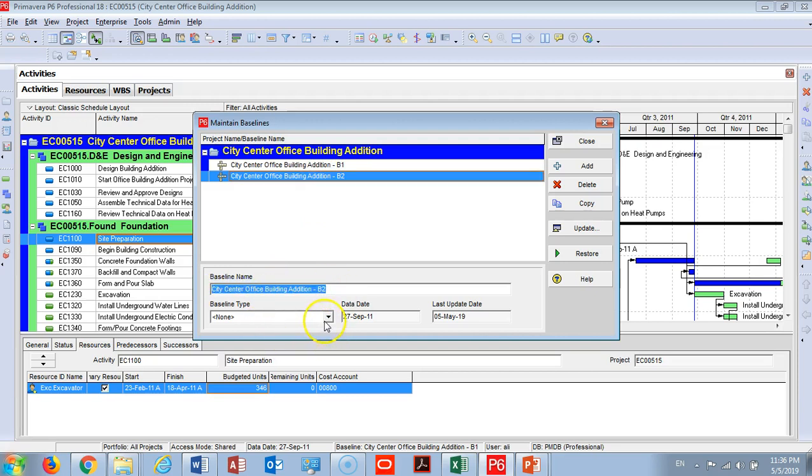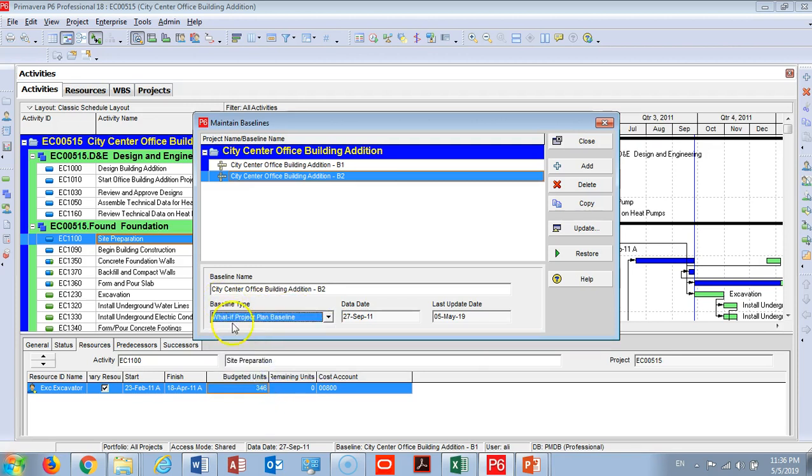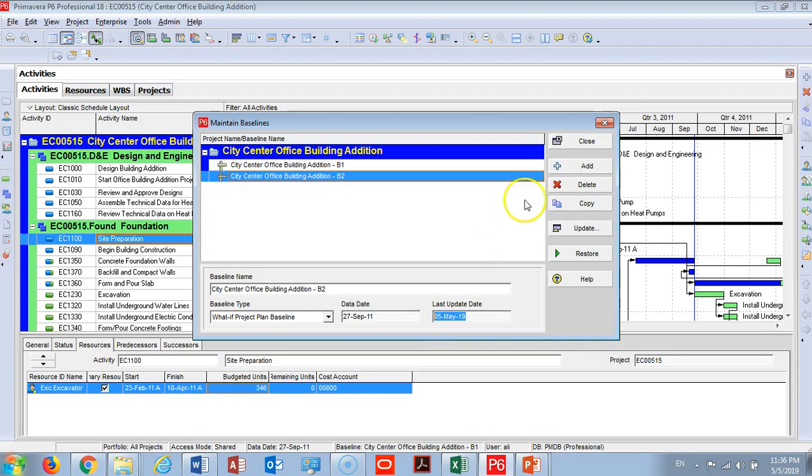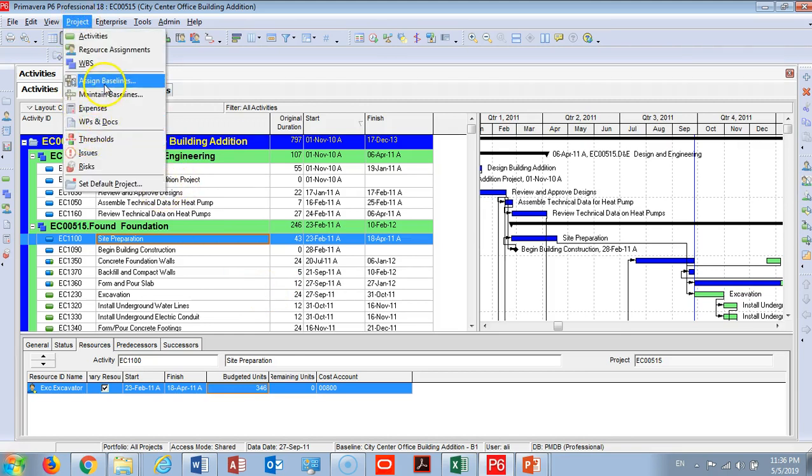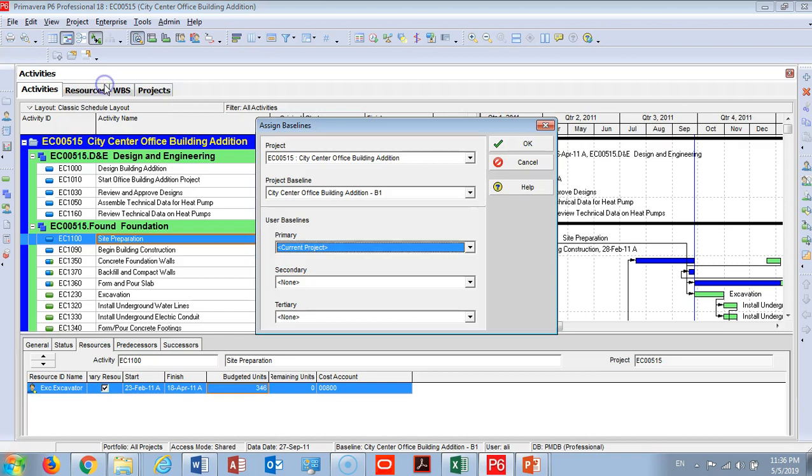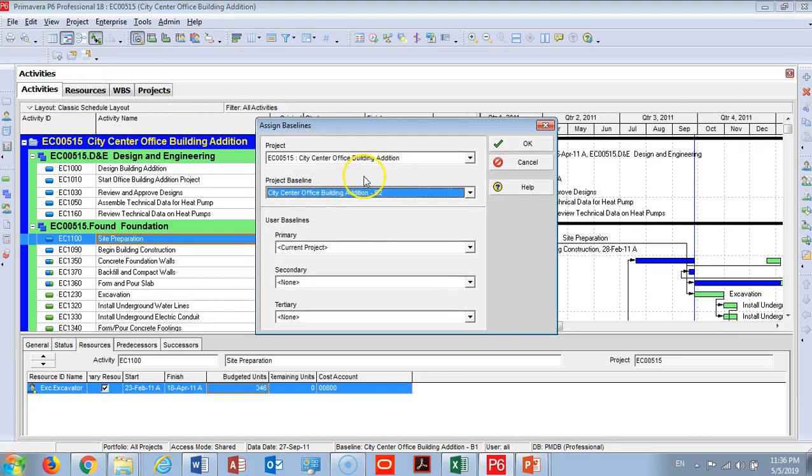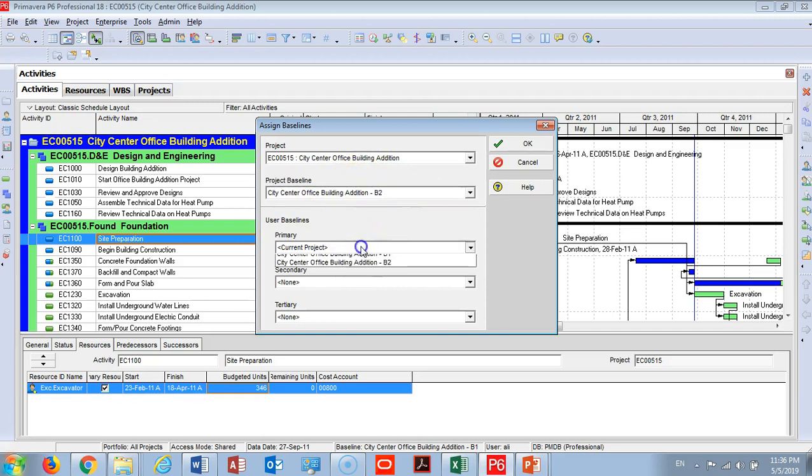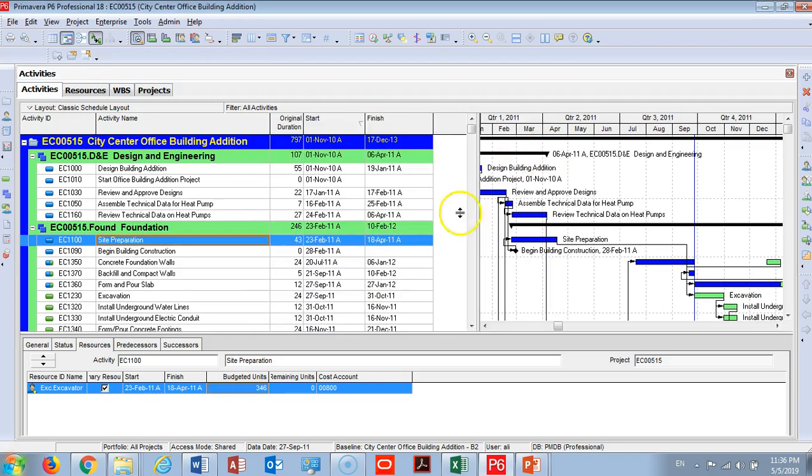I will choose what type of baseline. Maybe I will see this is a what-if baseline. Here is the data date and here is the last updated date. So now we have created the baseline. What is the next step? You go to Project and then go to Assign, and I will go to Project Baseline. I need to choose B2 as a baseline and also I will choose it as a primary baseline because I would like to measure all my progress dates to this revision.